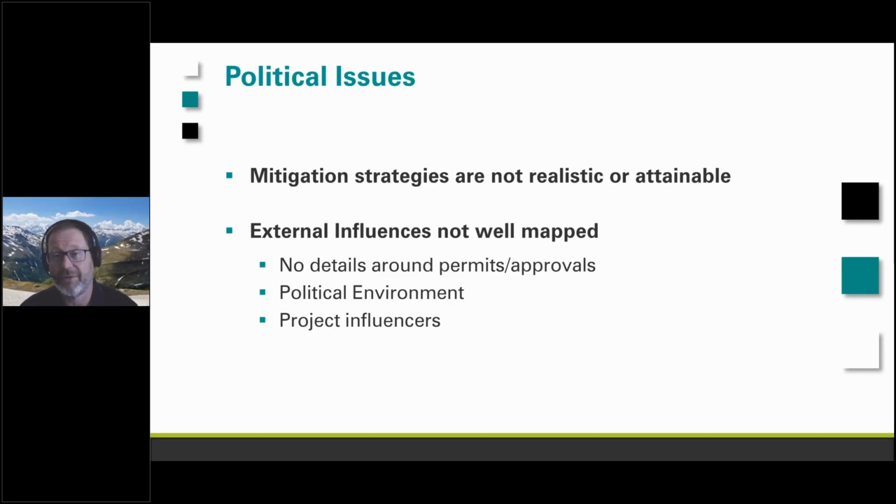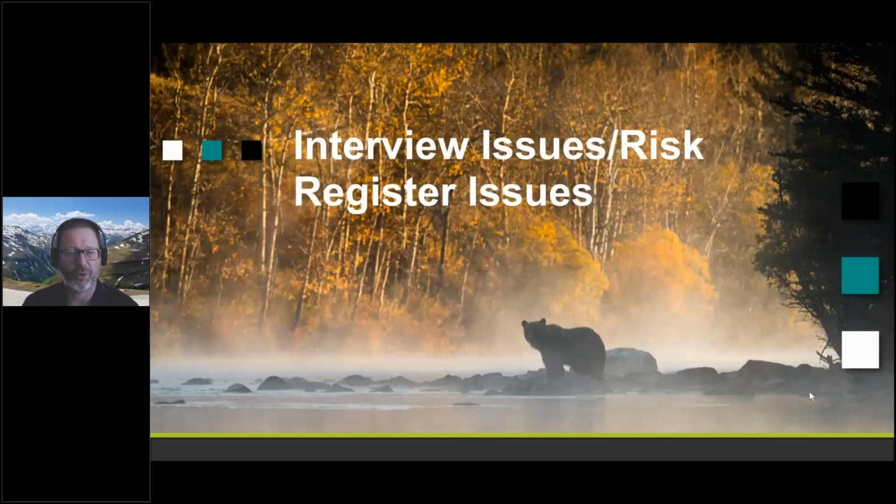External influences are often not well mapped. So when I'm talking about external influences, I'm talking about if the government changes, do you suddenly lose funding? Can you no longer get permits? You might have project influencers who live in the area of your project, what we call the not in my backyard or NIMBYs, who don't want the project to go ahead, and we need to manage all of that. Once you've actually started to work with the group and you've got a clear picture of what's going on,